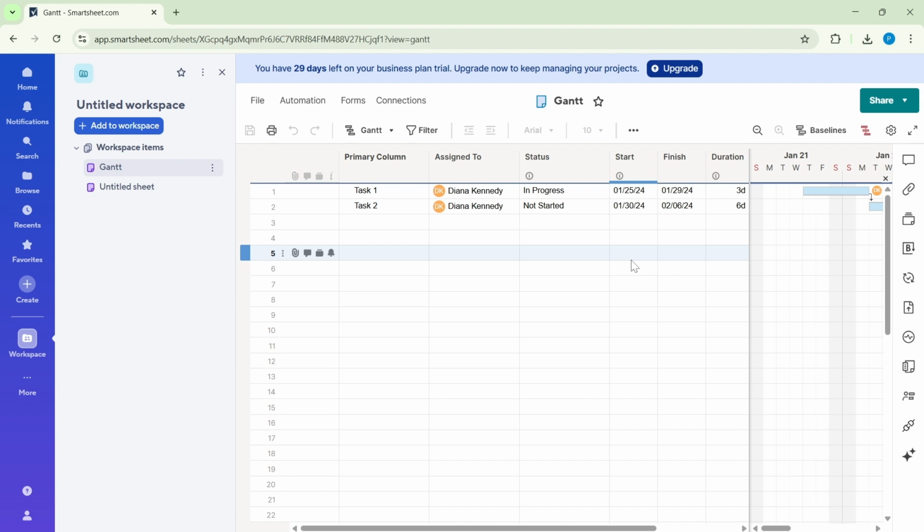If a task has 0 duration, it appears as a milestone. Great for key approvals or launch dates. Hierarchy is powerful here. Indent tasks to create parent rows that summarize the timing of their children. If you track % complete, you'll see progress shaded within each bar, which makes status checks easy at a glance.